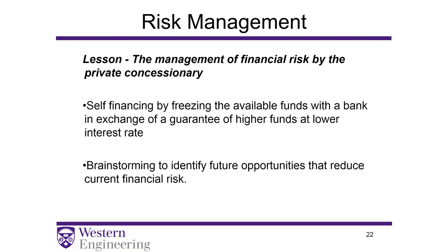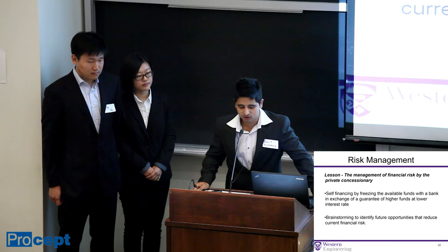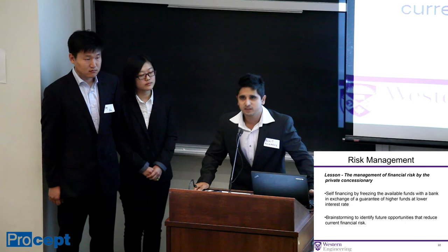The management of financial risk by the private concessionary is a very interesting thing about this project. Firstly, IFEJ had a 75-year concession period, and they had higher toll rates. This had done some work for them, but the war was far from over. They had to self-finance the whole project, and they had to show funds of 300 million euros.